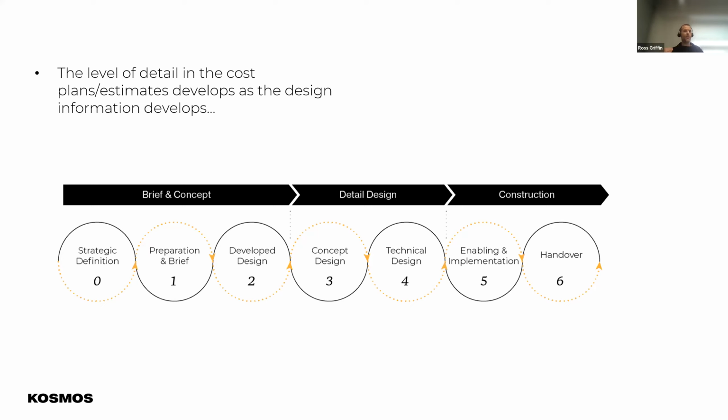You're also checking your previous work. You're checking your previous accuracy. Was that 150 linear meters of stud partition correct, or have we developed something new that's now 250 meters, for example? That's a major challenge if we haven't caught it in the change management process and our weekly meetings with the disciplines and discipline leads. So it's continually qualifying information as we build on what we've done previously.